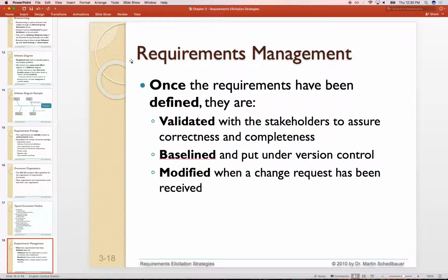We're only there to challenge them, asking, do you really want to do this first before that? And if they want to do that, then we'll change the baseline, and we'll point out the risk factors that they had identified and what the repercussions will be. But obviously the ultimate deciders are them.